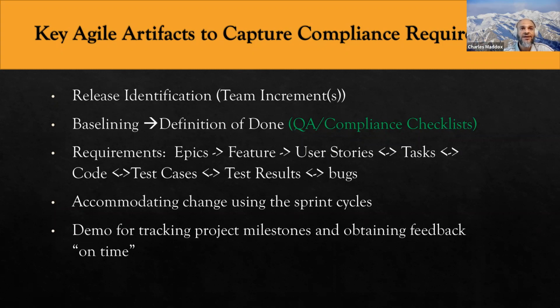The definition of done is a highly valuable artifact. And you can see I even have that highlighted in green, because a lot of the detailed quality requirements, down to code-level quality requirements like code reviews and things of that nature, you can capture in your definition of done artifacts at the story level, at the release level, even at the epic level. There are certain definition of done requirements for, like Krithiga mentioned, certain epics. Having a PSAC, what does that mean when it's done?